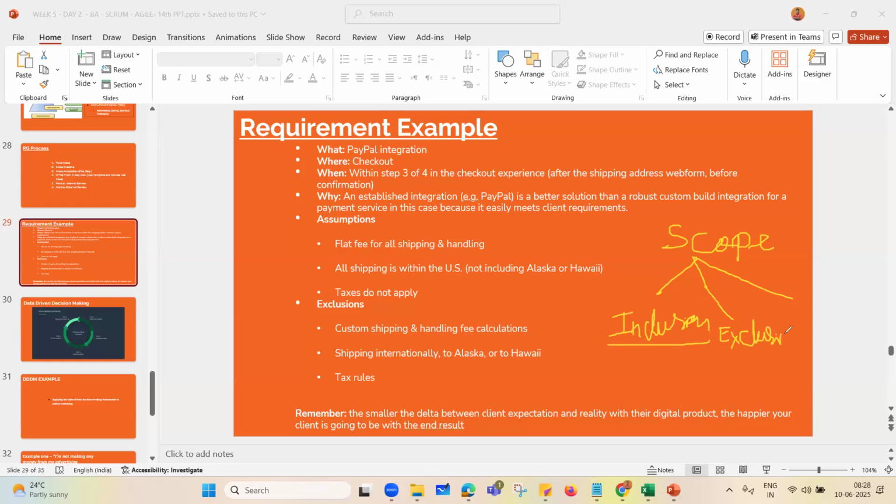All right. With me so far, say yes if you understood what I said. And there are a few items which the customer has not said at all, and we think that it is okay to assume, and the customer has not yet confirmed, neither have we taken confirmation from the customer yet. We will be parking those items in this section, which we call assumption.